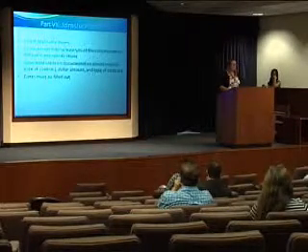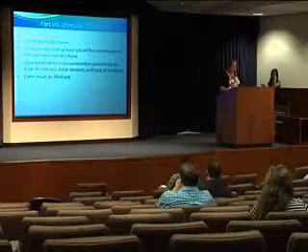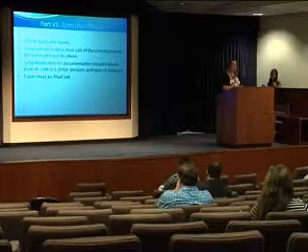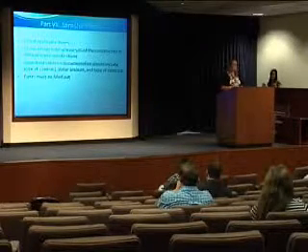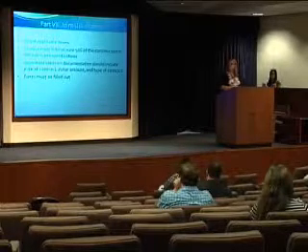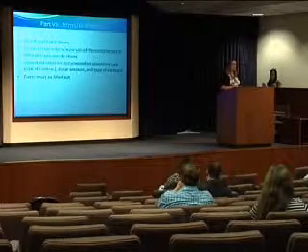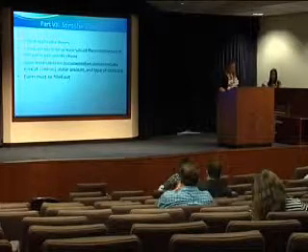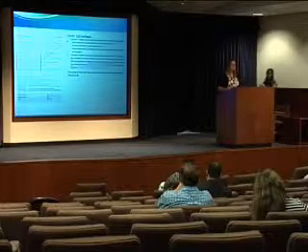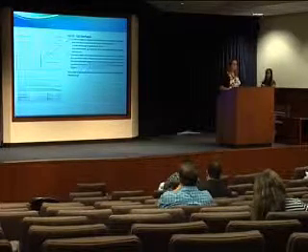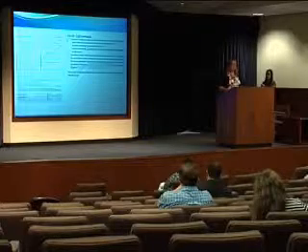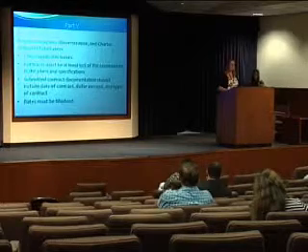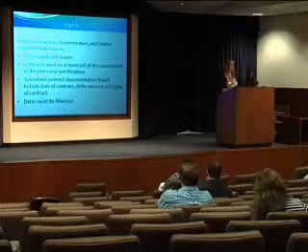Part 7, joint use projects. You check the appropriate applicable boxes. Contracts must be at least 50% of the construction in the plans and specifications. Submitted contract documentation should include date of contract, dollar amount, and type of contract. The dates must be filled out. Here's where you'll find the Part 7 on the 5005. And Paula's going to go over Part 5.